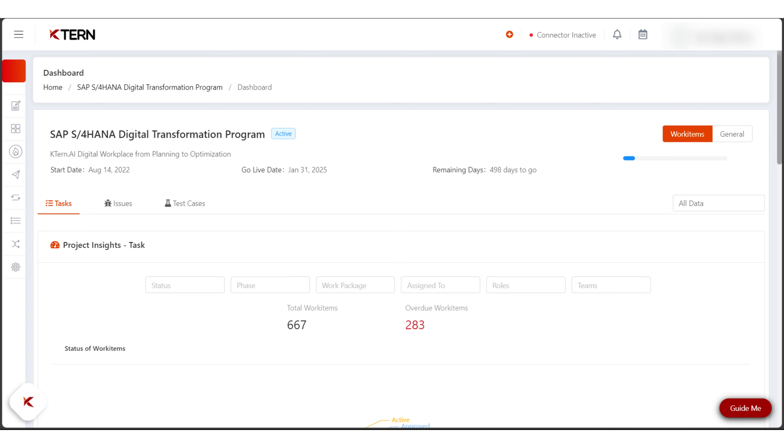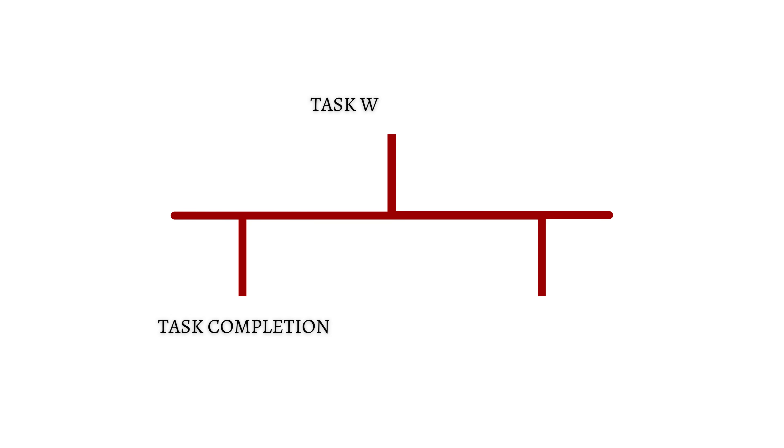You can configure the progress calculation metrics in three different ways: task completion, task weightage, and task milestones.